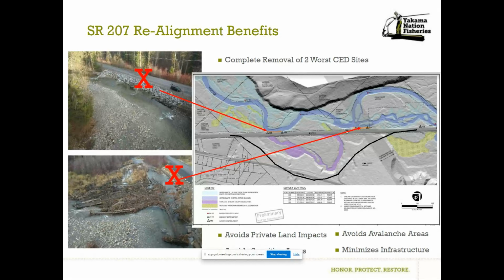And then we're going to go in and replant in some areas. We're going to maybe create some wetlands in some areas. And typically what that means is you've got to dig down just a little bit to get in contact with that water table, and then create those wetlands to interact with Nason Creek. So all that fill would leave.